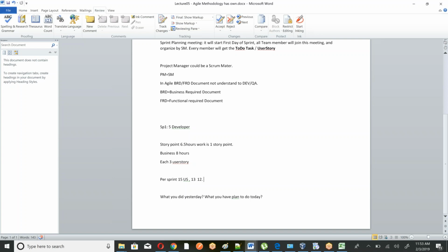In the sprint, if there are 5 people and everybody completes but you are not completed, it will go to the backlog. That means it is your bad credit too, because you could not complete. They will ask why you could not complete, because they do not give you the task beforehand. The first day is the sprint meeting, and during that time they will assign the task for 2 weeks. And then you need to complete it.